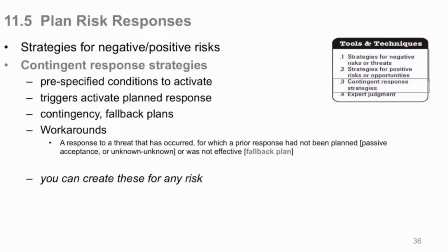You also have a fallback plan, that you activate if in fact your contingency plan fails. Let's say you can't get your goods out of the factory because of the picket line. Now your fallback is to just start from scratch with company C. That's your fallback plan.